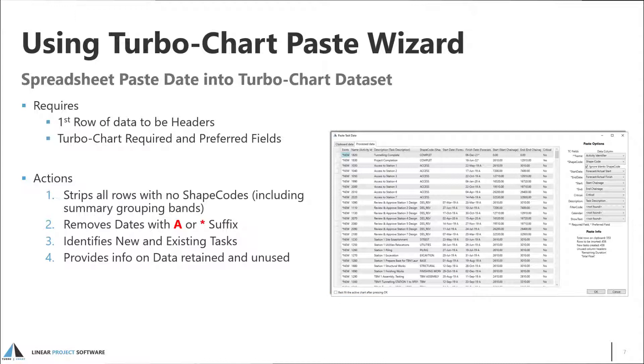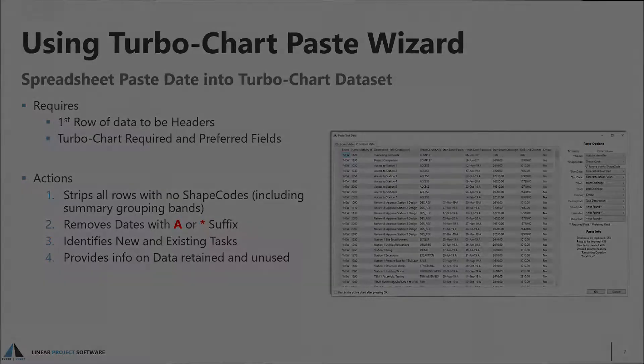The data is processed to remove all data rows that have no shapecode and tidy up the date fields to remove actual and constraint references. The Paste Wizard also remembers field mappings such that the next paste operation will use the previous mapping options.